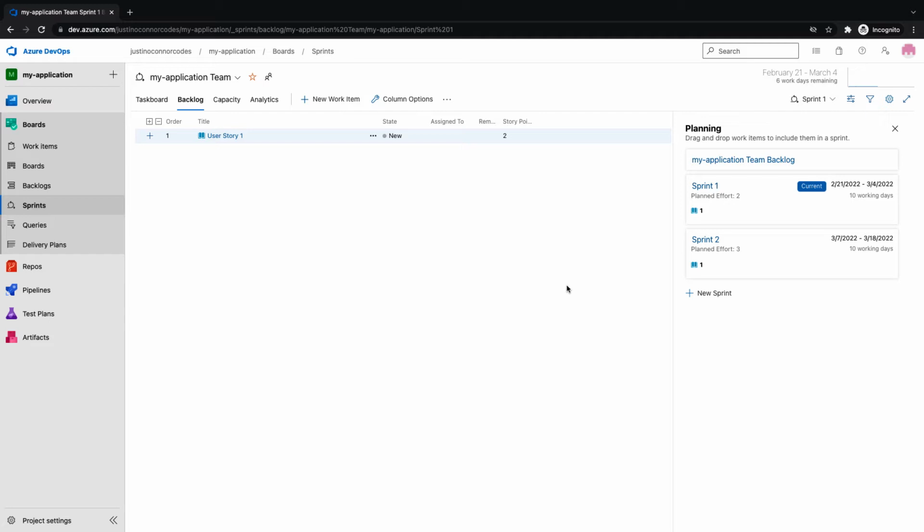A great way to do that is once you've got that velocity and once you've got these story points, you can use it as a gauge to see if somebody may be over or underutilized in a sprint. And then once you have this entire backlog built out, you can basically put it to the team member and say, okay, team member X, you have these 3 stories, they total 10 story points. That's historically where we're typically at. Do you feel comfortable committing to this? And if not, what do we need to continue to clarify to understand?